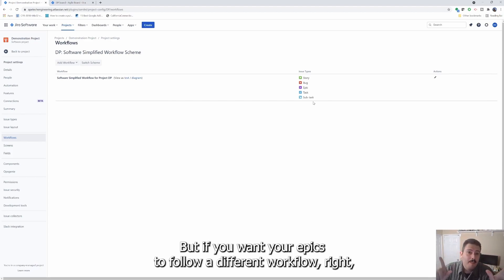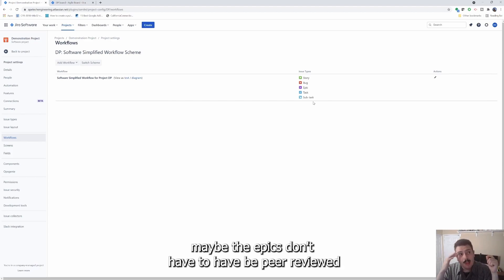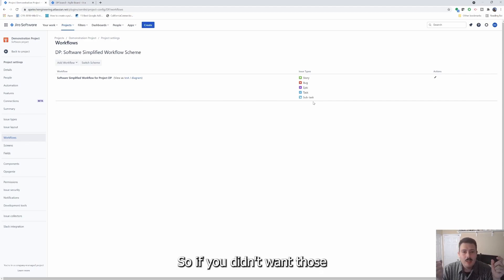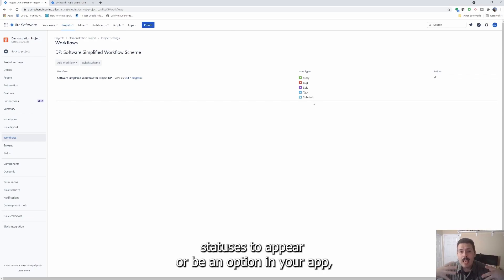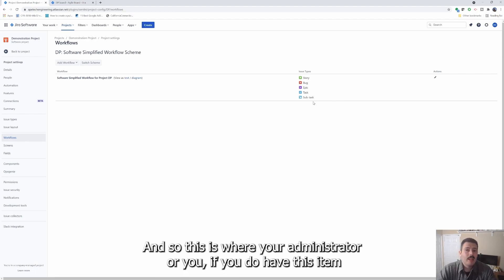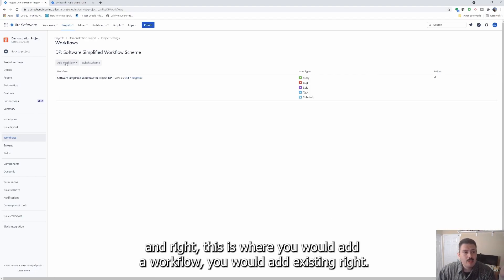Each issue type can have their own workflow. So if you wanted your stories, your bugs and tasks to follow the same workflow, as in they have the same statuses and they have the same columns in your board, you would define a workflow for that. But if you want your epics to follow a different workflow, maybe the epics don't have to be peer reviewed and maybe your epics don't have to go into QA, so if you didn't want those statuses to appear or be an option in your epic, you would want your epic to have a different workflow.